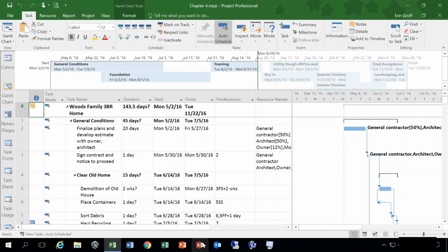At the bottom of page 66, work resources. A work resource is a resource that is employed on a time basis. The most common work resources are the people who will perform the tasks, also known as human resources. You can refer to work resources by name, such as Gary Clark, or by generic labels, such as landscaper, depending on your needs. In addition to human resources, work resources also include resources that you need to schedule or track cost on a time basis.